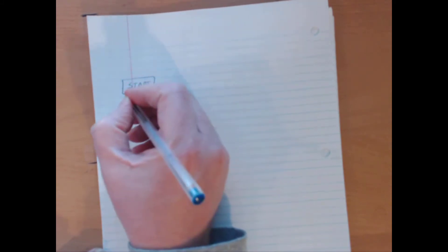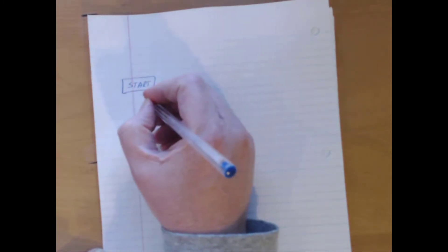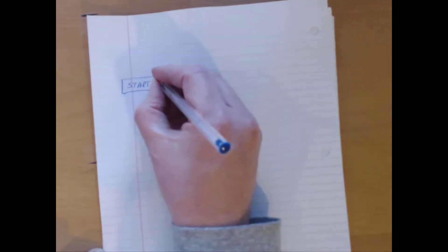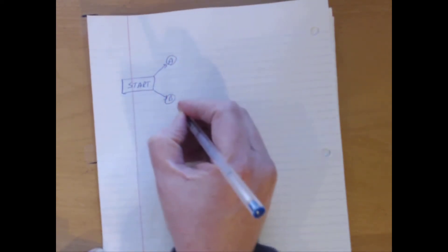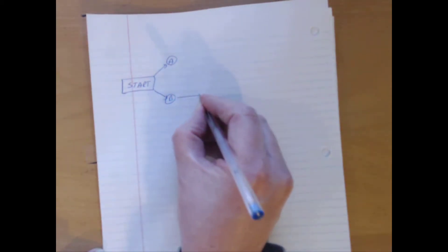We will start with a start. Up or down, left to right, doesn't matter. We do want to start. We do see when we look at this that A and B do not have any immediate predecessors. That means they are beginning activities. We have an A and we have a B. Then we look at C depends on B. B goes to C. We are all set there.